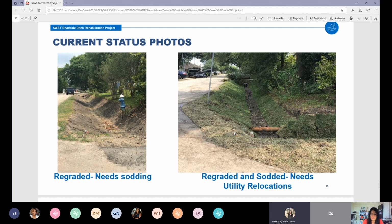2 driveways in a residence, the first thing we do is we go through our permitting center's ILMS system, which keeps record of every permit that happened in that neighborhood. So we pull up permits on every home if there was one, and we make a list of all the properties that had permits and the ones that did not have permits. So if a second driveway was replaced, that means that we got a permit either from our ILMS system, or the homeowner was able to pull up a permit from their records and show it to us that this was in fact a permitted driveway. So only in those situations where either ILMS had any documentation or the homeowner had any documentation, the driveway was replaced. If we could not find any documentation, the driveway was not replaced.